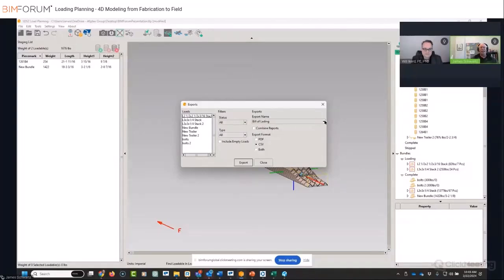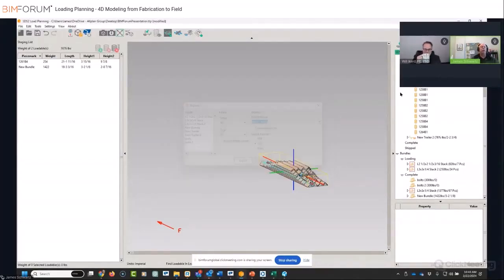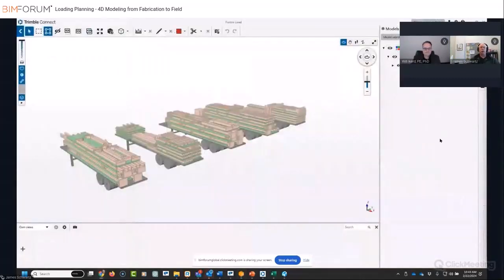So you have the bill of lading, which is a 2D. You have your load map, which is that 2D image. There are some other products that we interface with. There's the IFC loads, which sends out a 2x3, which is going to send all of that data rich information, plus any data that was added, like the loads or any work sets that you've added, to send that off to the erector. The same thing applies here with this IFC model. Just for time's sake, I've already done that on a different model, just to make sure everybody knows there's nothing up my sleeve.